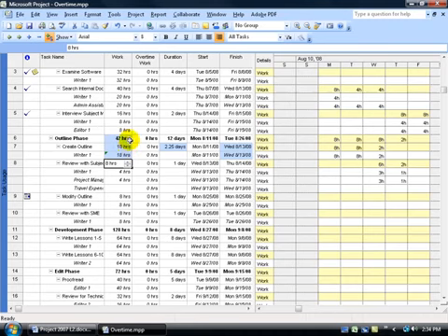It increased the outline phase's total hours from 40 to 42. And then more particularly, notice the duration goes from 2 days to 2 1/4. And then you can come over here in the grid and you can see that there's still the 8 hours on Monday and Tuesday, but it added the other 2 hours on Wednesday because again, the typical workday is only 8 hours. It can't take that 2 hours and bump it up and say it's 9 or 10.